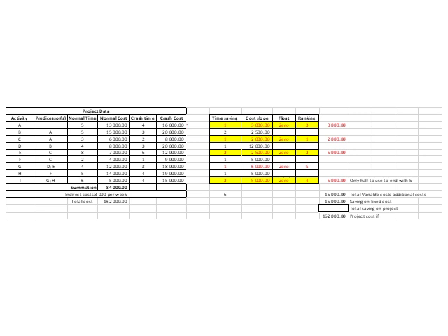That gives you your increasing cost, divided by your normal time minus your crash time, which is 1. So you have an increase of 3,000 rand here.